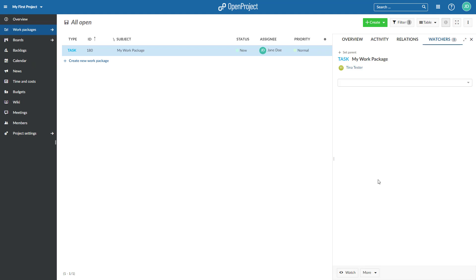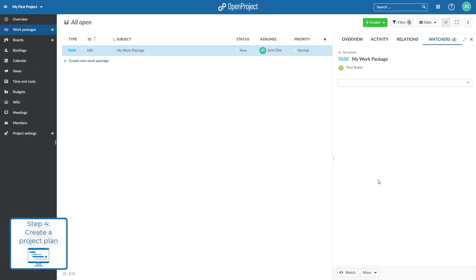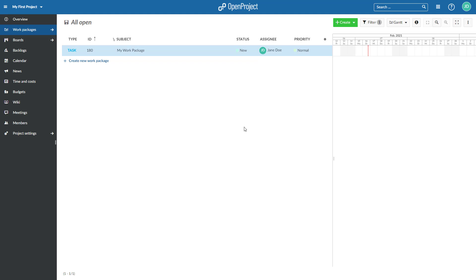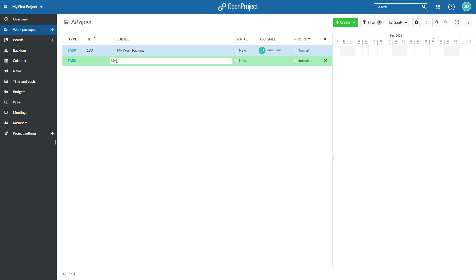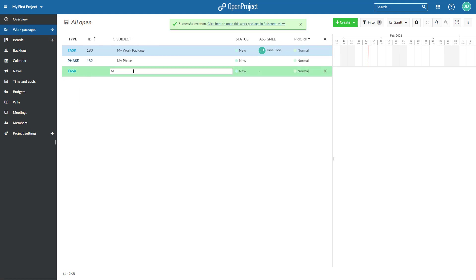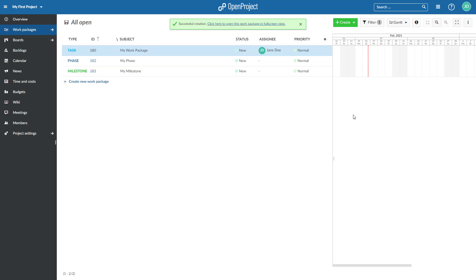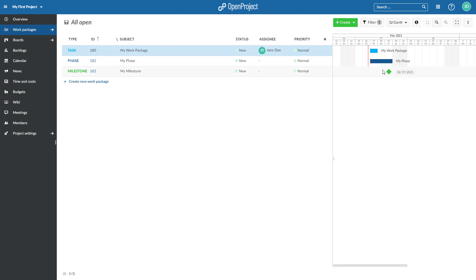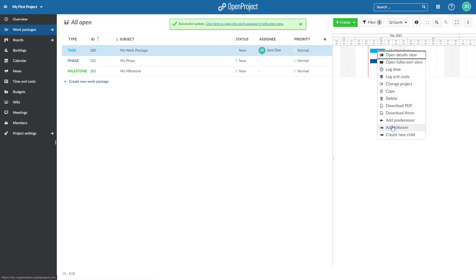The fourth step is to create a project plan. Activate the Gantt chart view from the drop-down menu on top of the work packages. Create phases and milestones directly in the Gantt chart and update it with drag and drop. Add dependencies with a right-click and choose predecessor or follower.